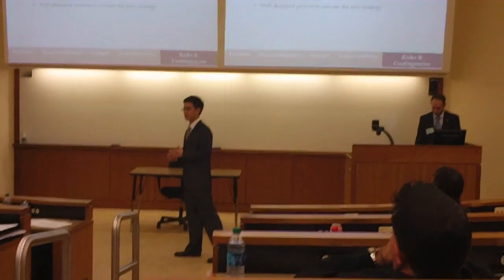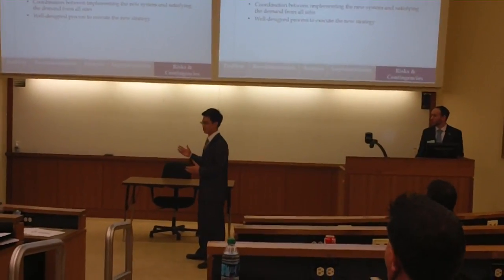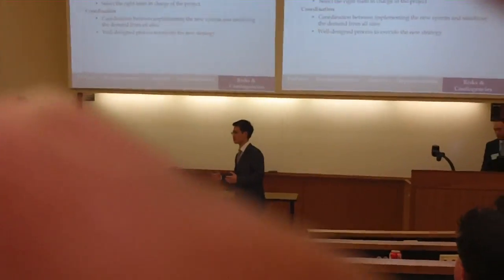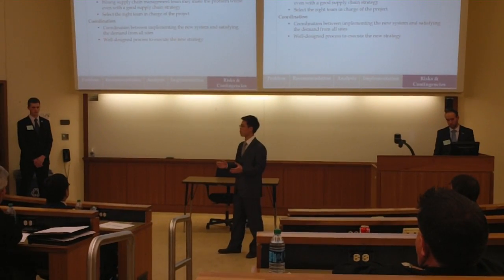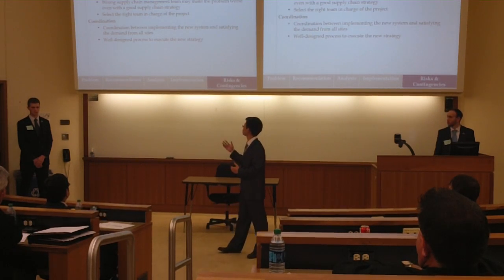To implement our strategy, there are a couple of factors you need to think about. First, always, is the economic condition. Once the economy slows down, it can negatively impact the demand for Eaton's services, so a major warehouse on the West Coast may be unnecessary. To hedge that risk, we suggest you enter into a short-term lease contract.